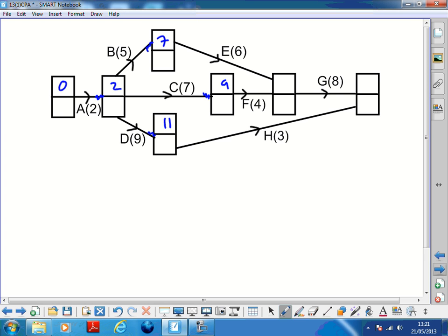And then consider here. Now I'm considering that would be 14, but I need to consider those first. So if we get rid of that, because there are two feeding in there and we can't do two yet. So there's two feeding into that one, so that's either going to be 13 or 13 again. So it is going to be 13. And you did consider that. 13 plus the 8 is 21, but also I've got that 8, and I'm considering that as well.